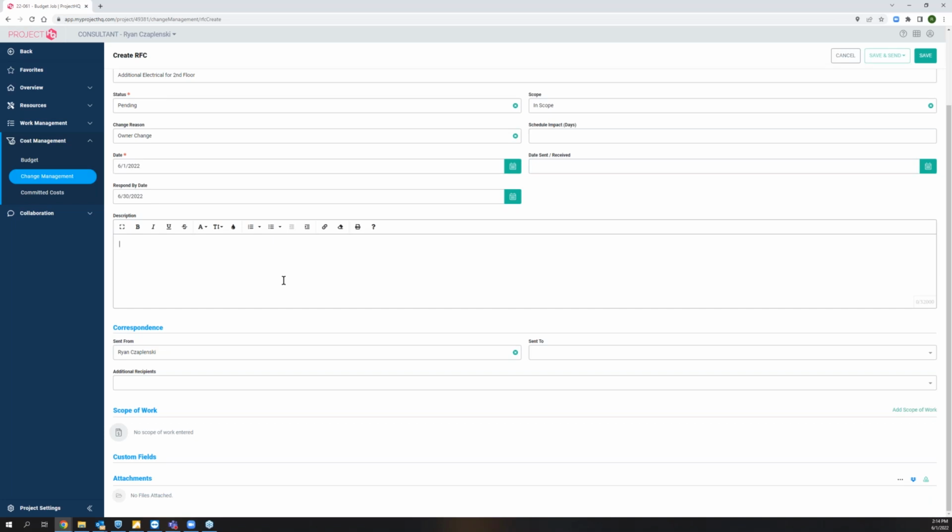If we were going to use that form, if we were able just to say, here, customer, here's your change order for $10,000, and not have to break that down into any line items or identify any unit costs or anything, we could use that form or that template that says just print the totals only. And in that case, we would use the description field here to type in what the description of the change order is. What is the scope of work? What are we adding? Is there any insurance considerations here or anything like that? However you would describe this change order to whoever's approving it.